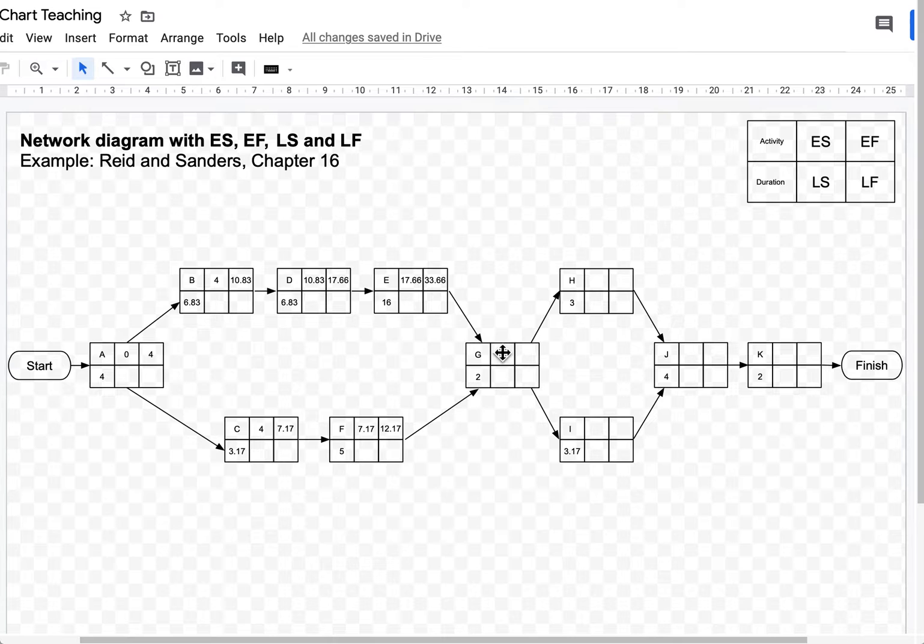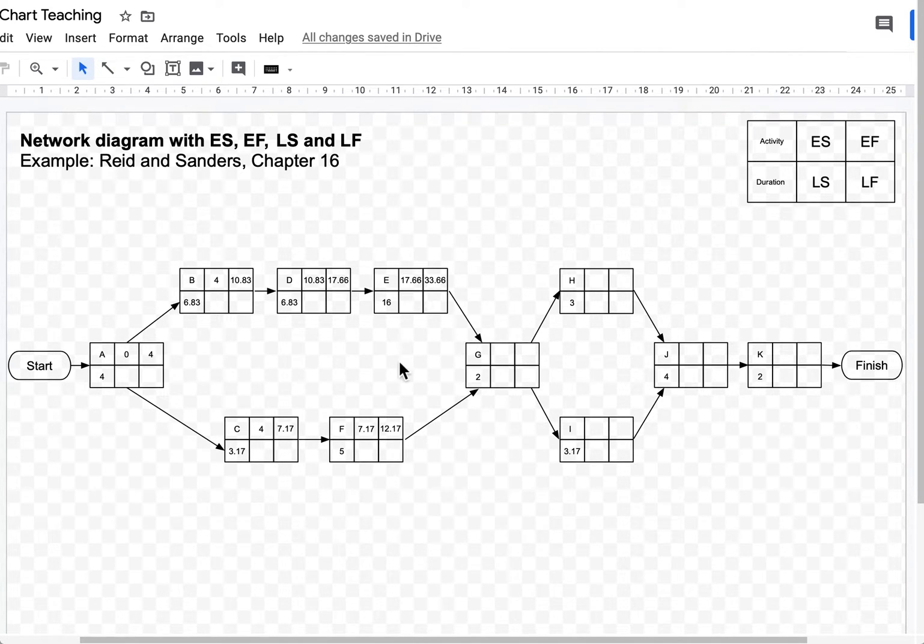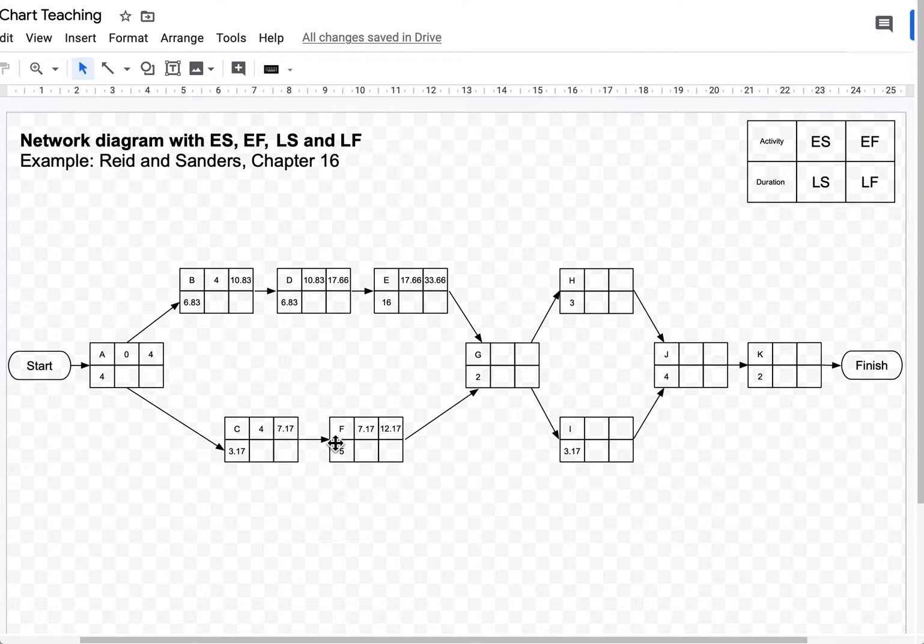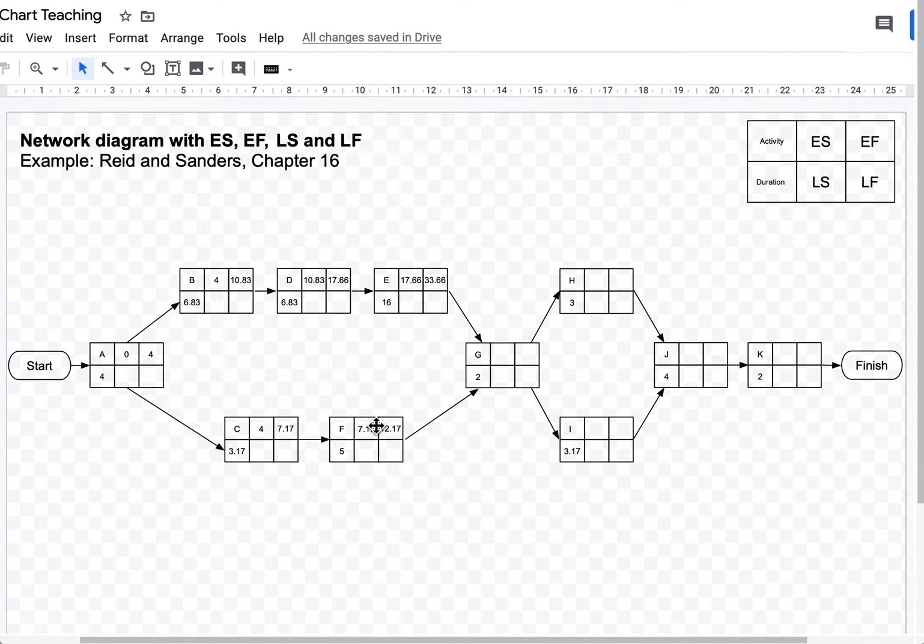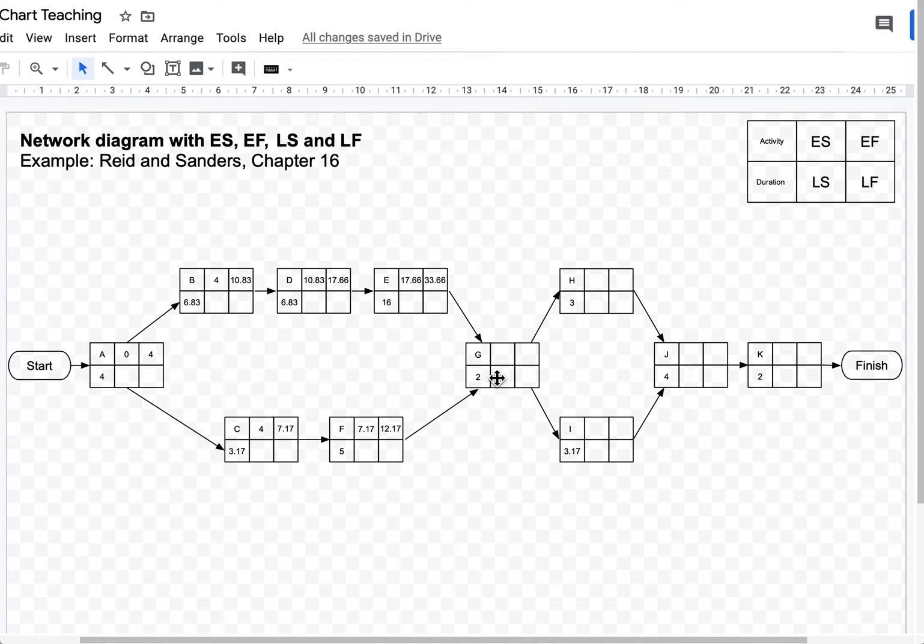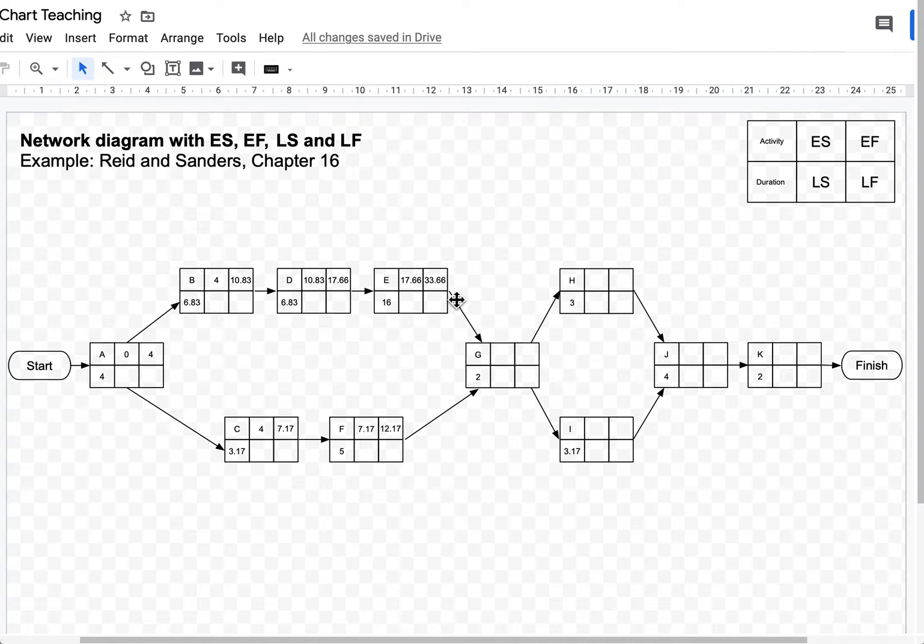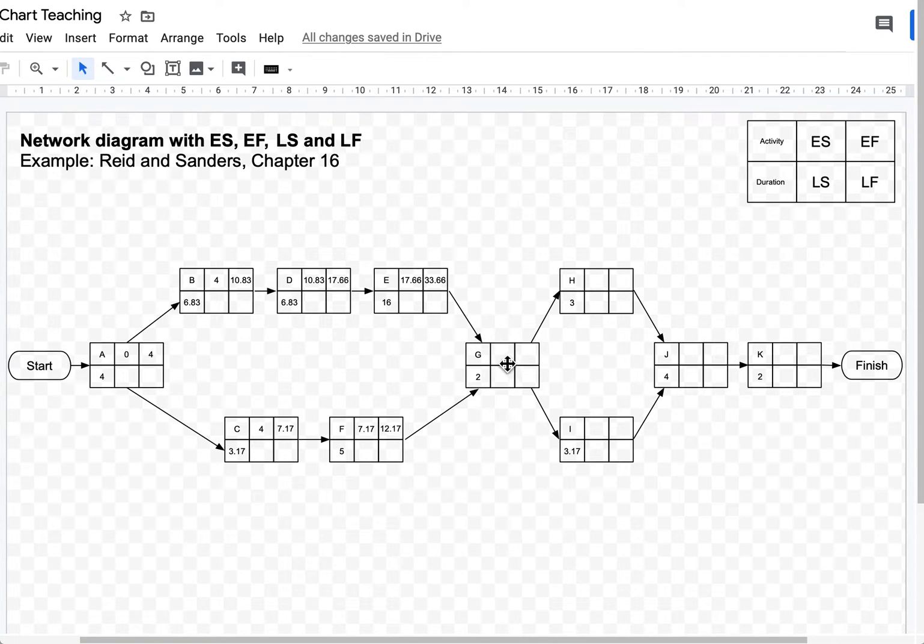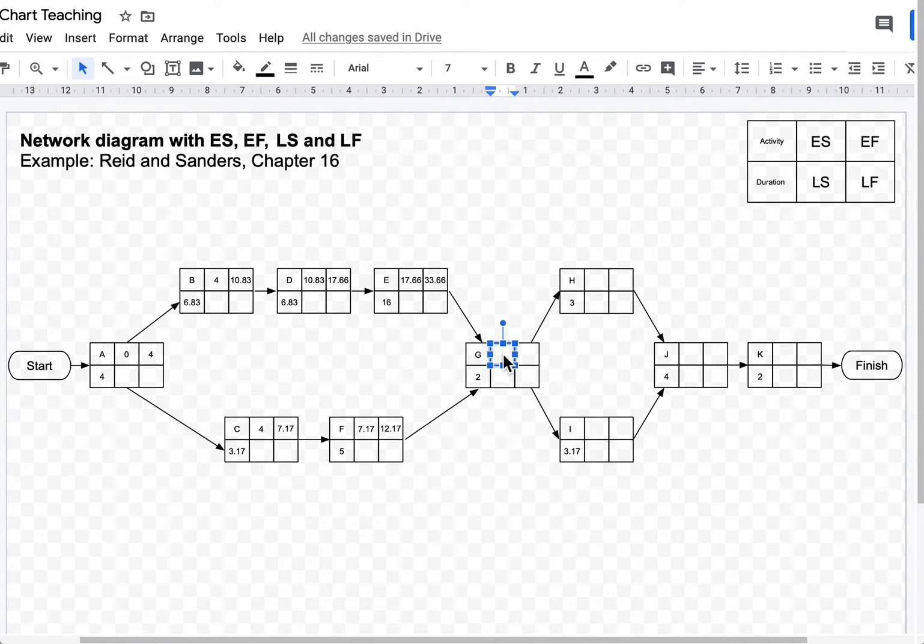Now, which number should I insert here? Should I insert 33.66 or should I insert 12.17? What we're saying here is that activity G can't start before both E and F are completed. So even if I finish activity F by week 12.17, that means I can't start activity G before E is completed, and E is completed in week 33.66. As a quick reminder, if it's the top row, you always choose the highest or the biggest number, which in this case is 33.66.